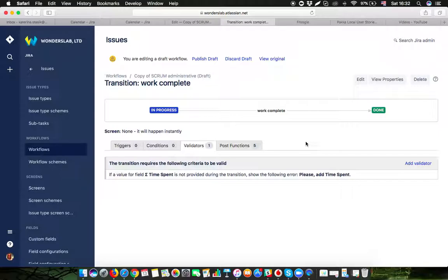At the end of your sprint, you want to go to the reports, see your timesheets, and see how much the deviation of your estimations is, and calculate that as a percentage of deviation, and that will be another good tool to predict your planning. Because when your team estimates that in general they need 40 hours to accomplish something, you can use your deviation and be ready and manage your risks and know that, okay, yes, it's 40 hours, but it might be 5% more, because usually the deviation is 5 to 10%.